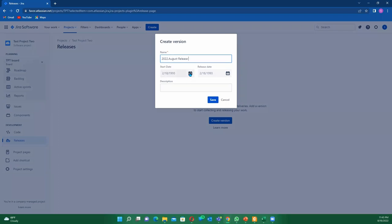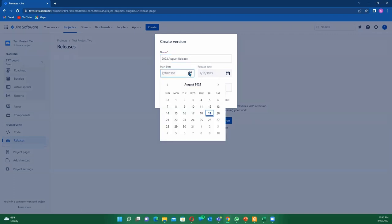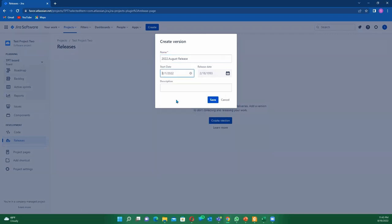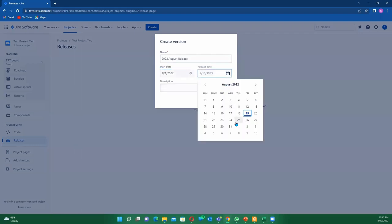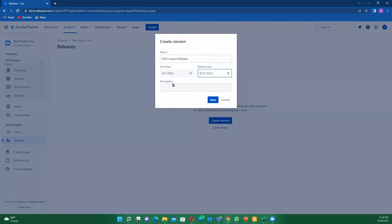Most organizations ideally deploy monthly, so it's always good to go with that so that you won't put the developers under pressure and at the same time we're delivering value. Since we have this as August, we can have the release from the first of August and then we can end it on the 31st of August.